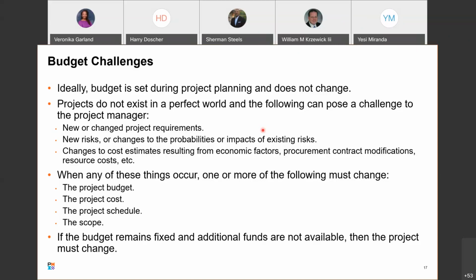Yeah, it is. Waterfall is much harder to deal with. You have to go through a change control process for any of the changes that are requested. With an Agile project, you may be able to accommodate that at the team level, where you'd have a product owner who would naturally be aware of what the change requirements are, what the impact is to the development team itself, and the relative priority to the rest of the tasks that they have to do.